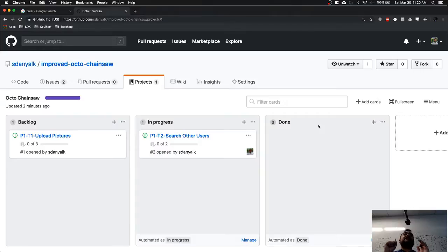When somebody says an impediment or an issue, you don't start discussing right there and then. You let the whole team go around and complete these things. And then you make a note of who said they have an issue. When the stand-up is complete, you ask that person who has the issue, hey, who do you want right now? Don't waste everybody's time. That happens a lot.